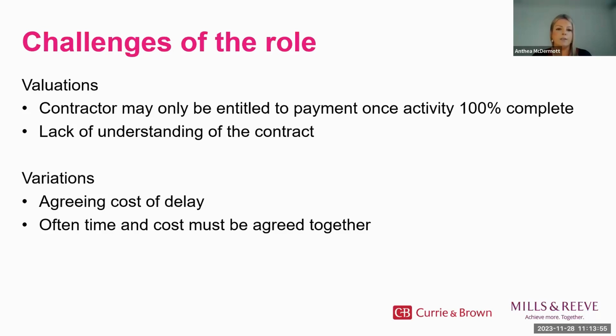This is prohibited under the contract and can cause many issues. In cases such as these, the contractor has not taken the time to break down their activity schedule into sufficient detail in order to give them the cash flow that they need. Most challenges faced of valuation, in my opinion, are triggered by a lack of understanding of the contract entered into. It's always worth meeting with the contractor's QS prior to the contract commencing to agree expectations for the contract mechanisms.